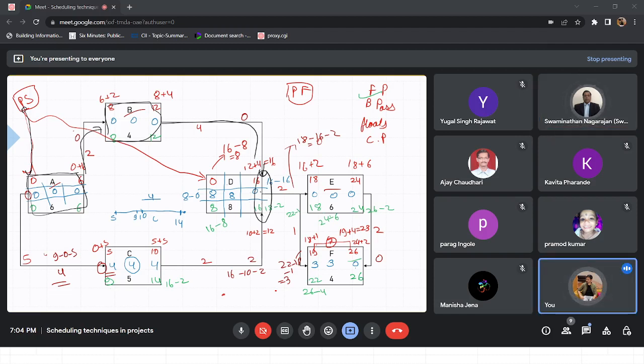You can't mess up this point. D to E is finish to start, no confusion because there is only one. E is completely critical. E to F is only the finish part, so that you don't mess up with the total duration. So that kind of sums up our first portion, PDM.